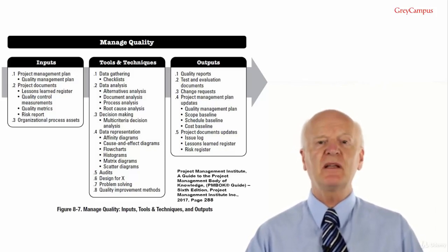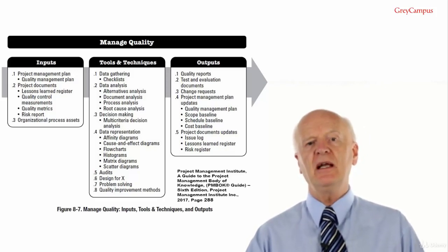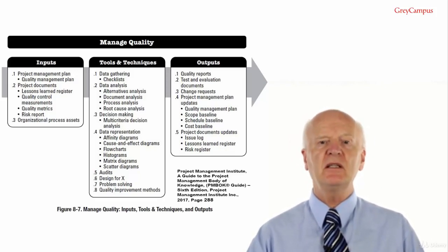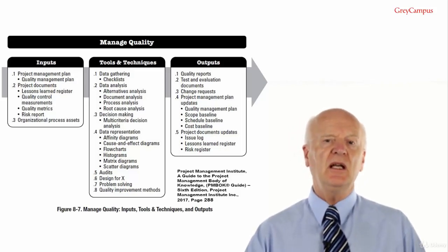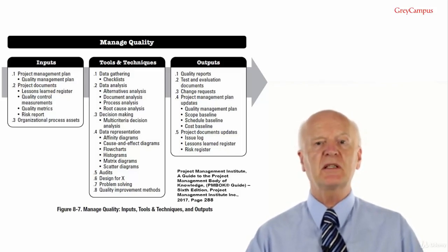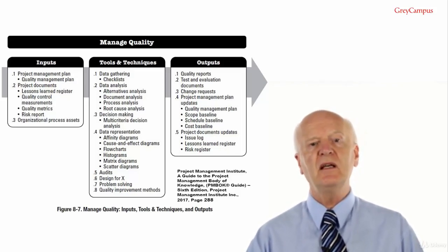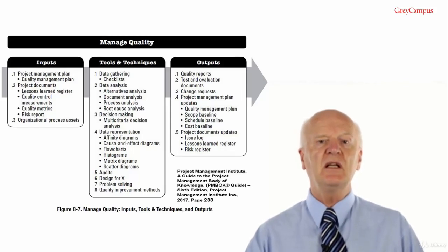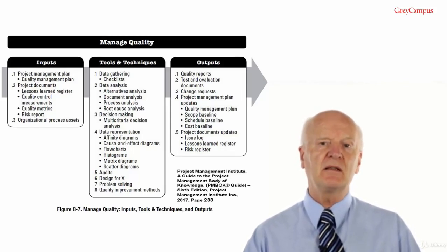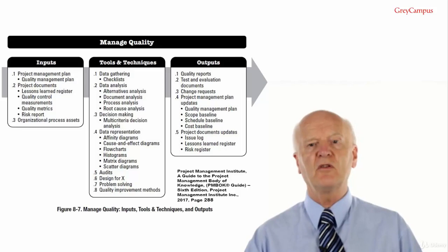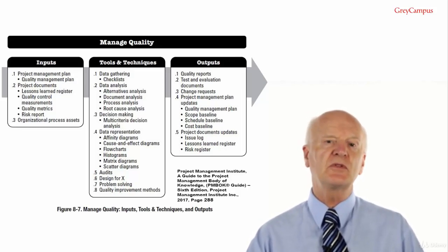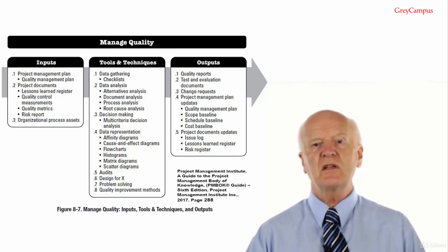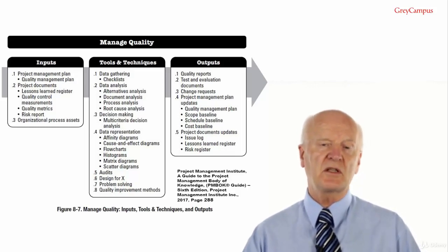Quality audit objectives may include identifying all good and best practices being implemented, identifying all non-conformity, gaps and shortcomings, sharing good practices introduced or implemented in similar projects in the organisation and/or industry, proactively offering assistance in a positive manner to improve the implementation of processes to help raise team productivity, and highlighting contributions of each audit in the lessons learned repository of the organisation.